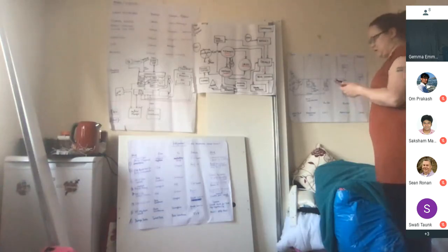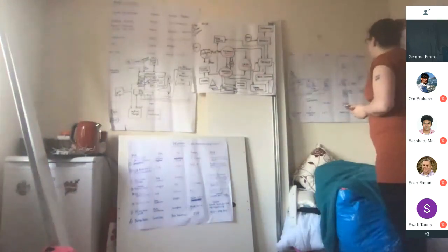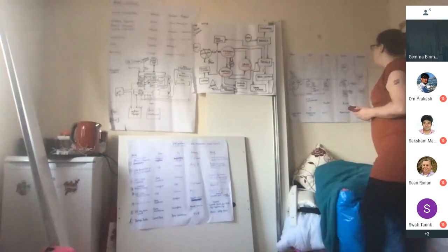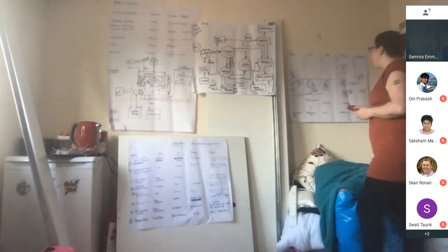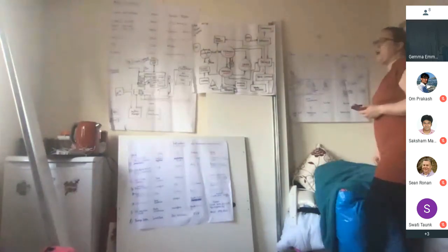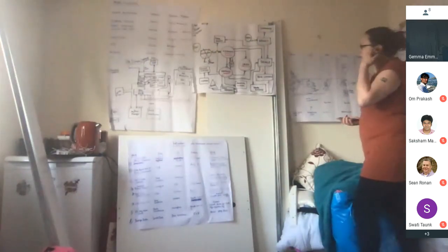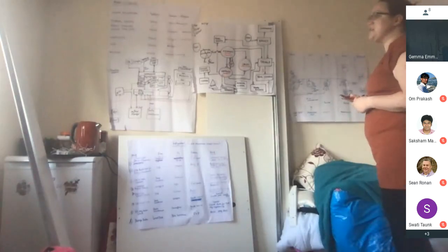once you start to integrate these things, there's a lot of errors, so it can be a bit of a full-time job. But we will basically refresh down into the UAT sandbox from Git, where we can then allow the business to come in and conduct UAT, user acceptance testing. Now that is a high-risk area, because obviously, if you're working with business users, UAT can tend not to